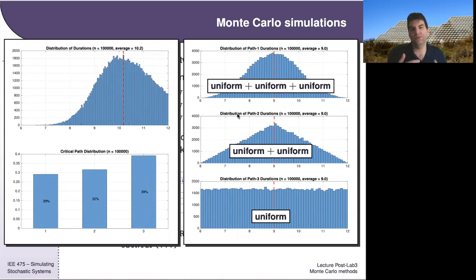And what we're seeing across these three branches is that this in itself is very, very unlikely, because if you're lucky enough on 2 of these distributions to get a low number, the other distribution, because it's drawn independently, may itself get a high number. What's even worse is that this uniform distribution is just tossing numbers everywhere. So if you get lucky enough to get a low number on the top branch and a low number on the middle branch, there's a huge probability that the number you get from the branch below is going to be above 9, let alone above the number that you drew.